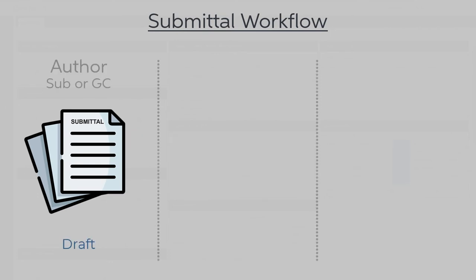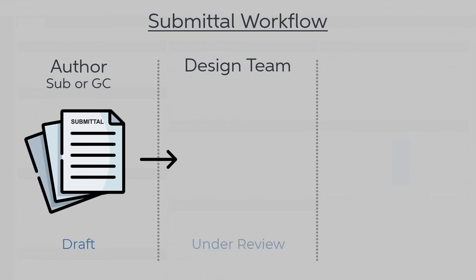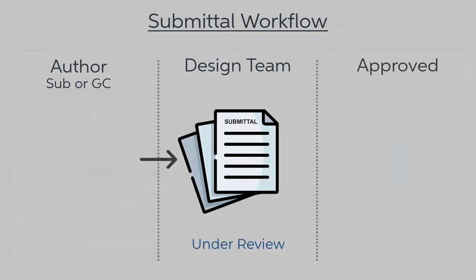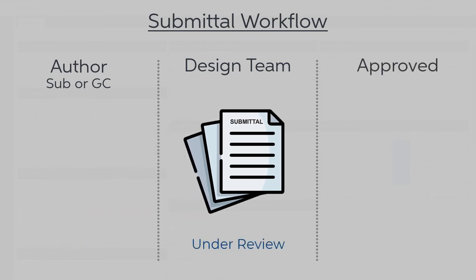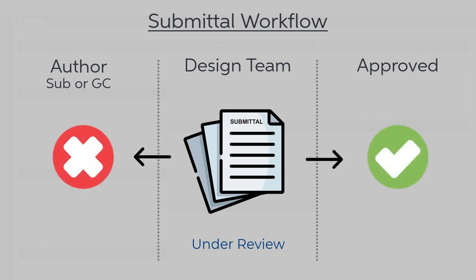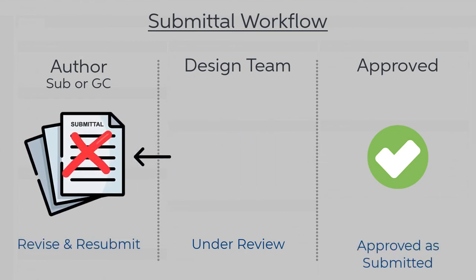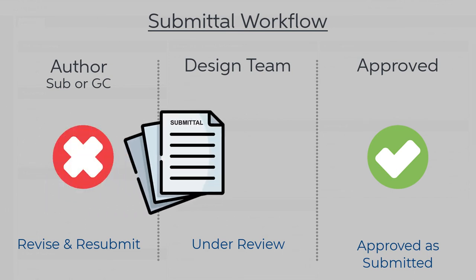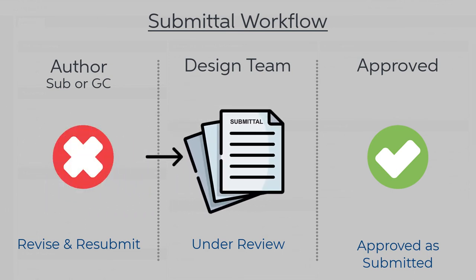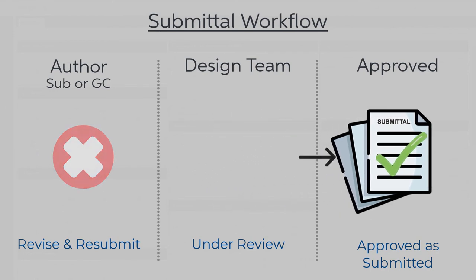First is a draft mode from the general contractor or subcontractor who is generating the submittal. When the final selections and appropriate documentation have been collected, it's time to submit for review to the design team. Once in the design team's domain, they review the submission and approve or reject according to the adherence of design documentation. If rejected, this submittal goes back to the author for revision. This process continues until ultimately the submittal is accepted by the design team and the final selections have been approved.